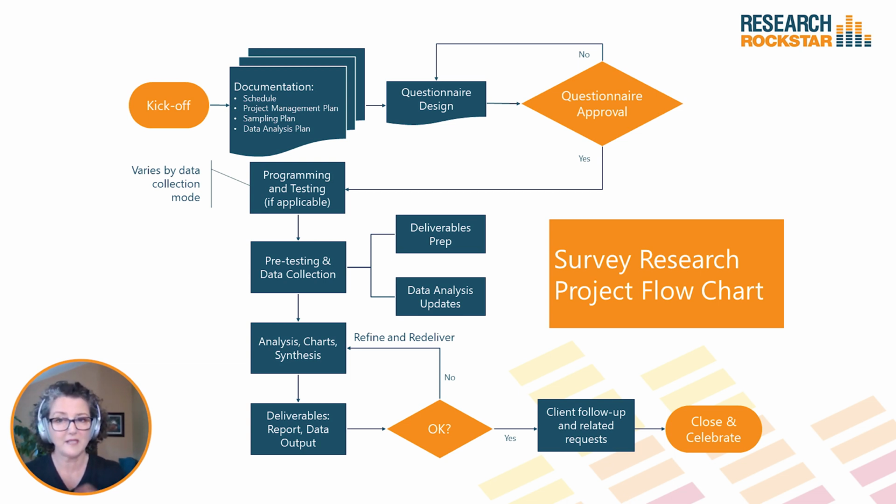The other thing is by documenting all four types of things right after the kickoff meeting, this is also going to prepare you for success in the questionnaire design process. If you don't have absolute clarity and buy-in to what's going on in terms of the sampling and the data analysis plan, you are likely to get into an onerous number of questionnaire drafts before you get to questionnaire approval. And we want to avoid that. So after you get all those documents done and everybody agrees that they're finalized and they've been approved, now you can proceed to questionnaire design.